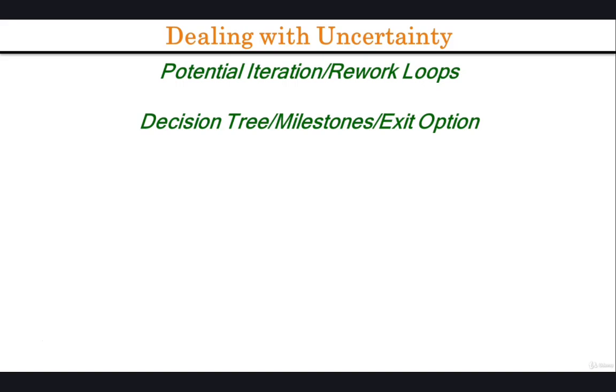Decision trees map out the potential scenarios that can occur once the uncertainty is resolved and the potential set of actions that can be taken in each scenario. A key insight that can be derived from such models is the observation that it is often substantially cheaper to exit a project early instead of letting costs escalate and then exiting the project later on at higher costs. The project management implication of this is that it is very desirable to move activities that resolve this type of uncertainty, feasibility studies and market research, to the early part of the project.